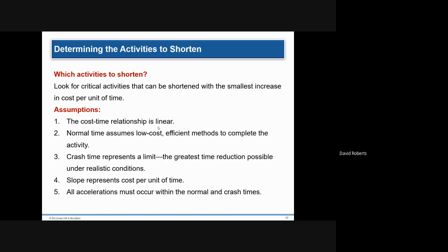And project management people know that. There's no possibility of a positive number, because what you have is an increasing cost, which would be your numerator, the top part of the formula, and a reduction in time, which would be your denominator. So you're always going to have a negative on the bottom. So you always have a negative answer.